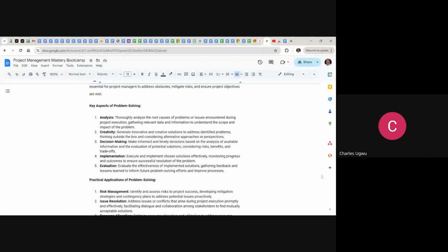If there is a problem you are solving with your team, when we were discussing the RAID log or risk analysis, you can see that every problem, risk, or issue captured is assigned to somebody, and there should be a time limit to solve any problem. You can't solve a problem forever.